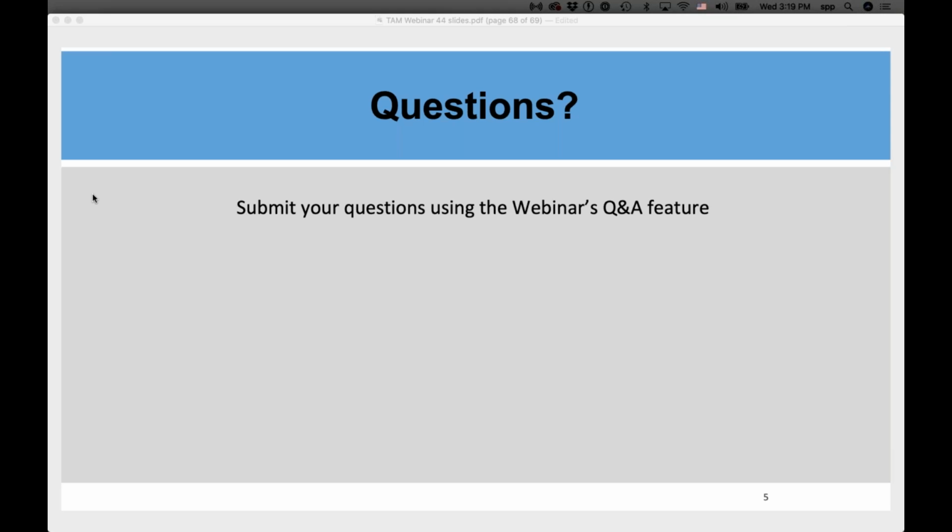We have, I guess you call it a process where we are watching the over/under on each project. So when it reaches a certain limit or a percent, then it has to be reviewed by our executive or one of our chief engineers. And then they start asking the questions, why is this overrunning? If it is determined as, hey, it's got to stay in the program, then something has to be moved out in order to continue with fiscal constraint. And then we also have to measure, is this going to negatively impact performance or positively impact? I know that's not a very detailed answer, but each state has their own process, and that's pretty much how Wyoming does it.